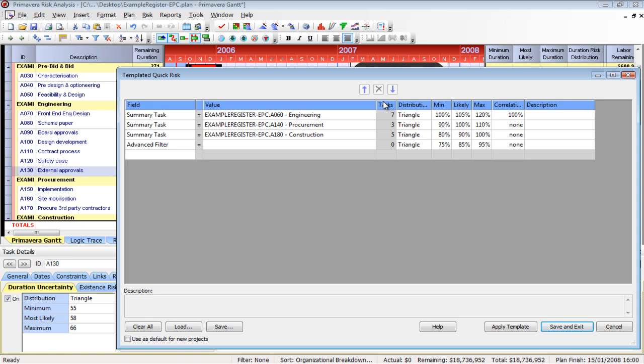And it really is a shame that Monte Carlo has gotten such a bad name in schedule risk analysis because of issues like that. So it's important to understand the schedule, it's important to understand statistics, and it's important to come up with a quick, repeatable, well thought out strategy. So if I can turn 1,000 activities into 35 groupings of risk, I can get input and buy-in from everybody in a 4-hour session. So that's what we're trying to do, is minimize the time invested from the team, get everyone to understand and buy into what's going in the system, and then go from there.